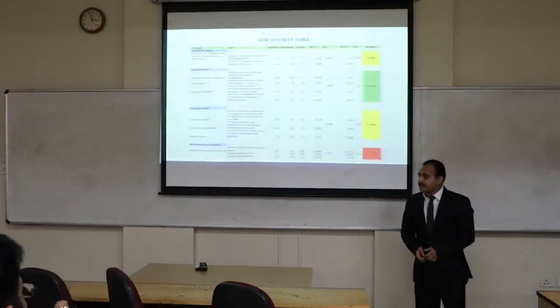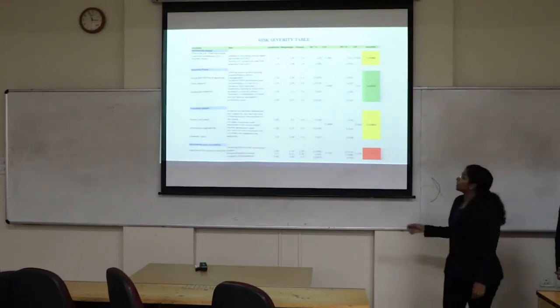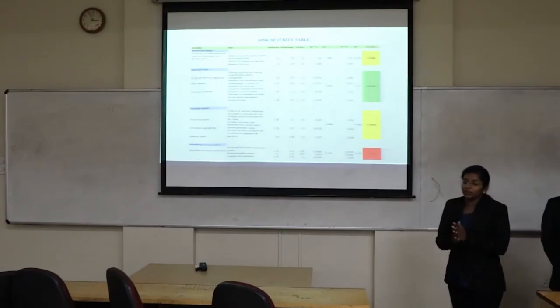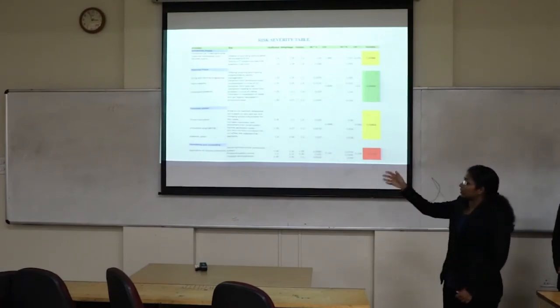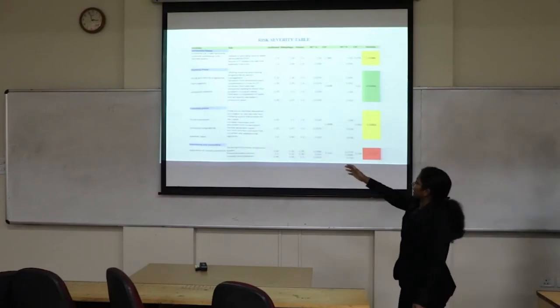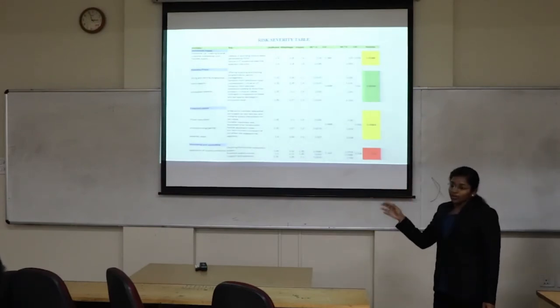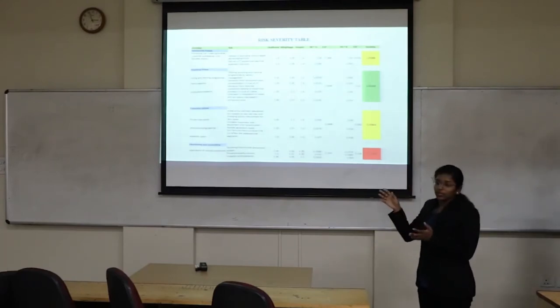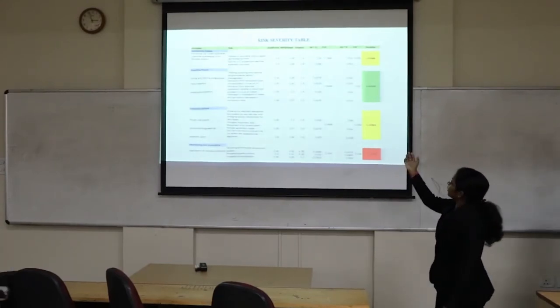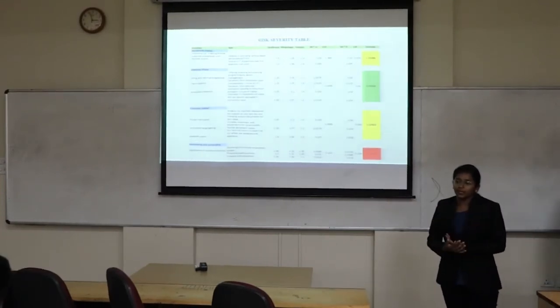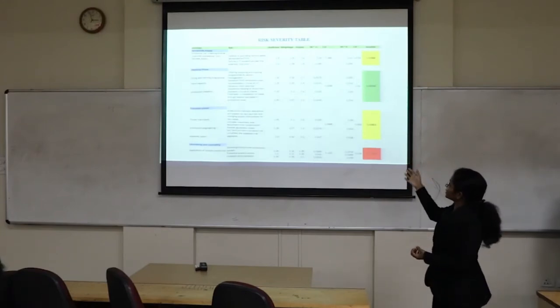This is risk severity table. I have took all the activities from the work breakdown structure. All these activities are divided into risk. We have four phases: planning, execution and monitoring and control. In all these phases what are the risks associated I have written. Likelihood is the chances of occurring the event, and next is weightage and impact.